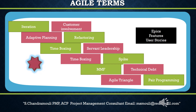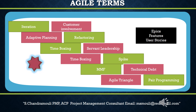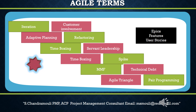An example user story: as an end user, I want to purchase the model question papers online so that I can avoid delay in purchase. The 'why' part is optional but better to describe. Confirmation is the acceptance criteria of a user story. The customer captures these criteria, and acceptance tests are designed to exercise the system in enough ways to demonstrate that the feature really works.